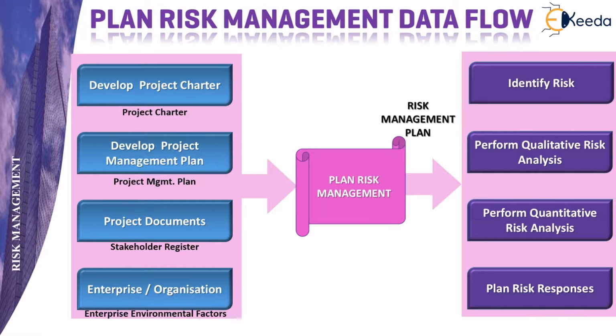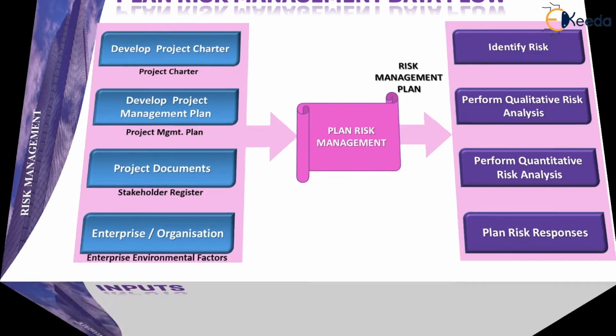The plan risk management data flow is shown, where inputs like the project charter, the project management plan, project documents like the stakeholder register, and enterprise environmental and organizational factors contribute to identify risks, perform qualitative risk analysis, perform quantitative risk analysis, and plan the risk responses.